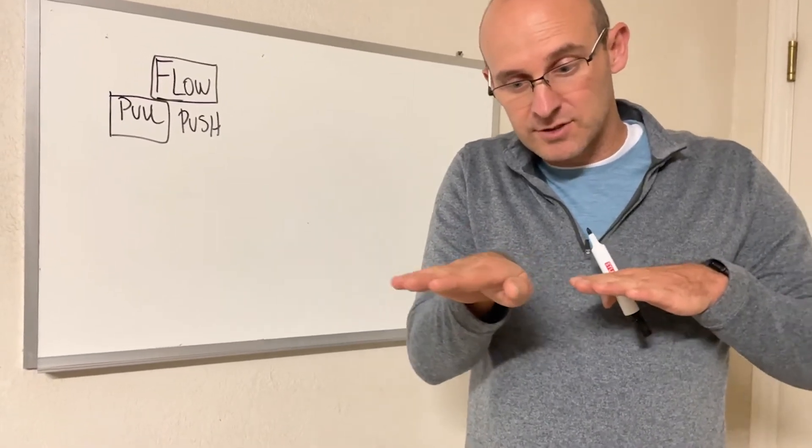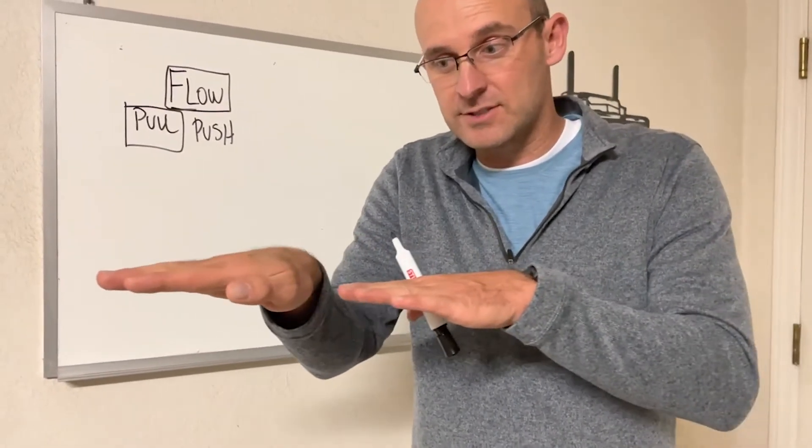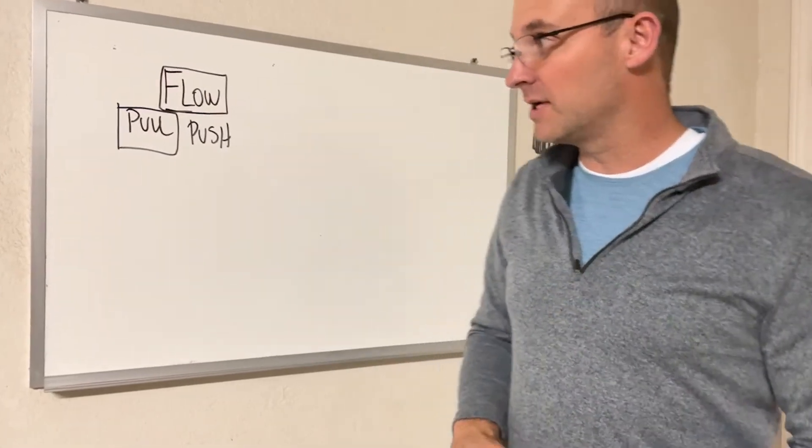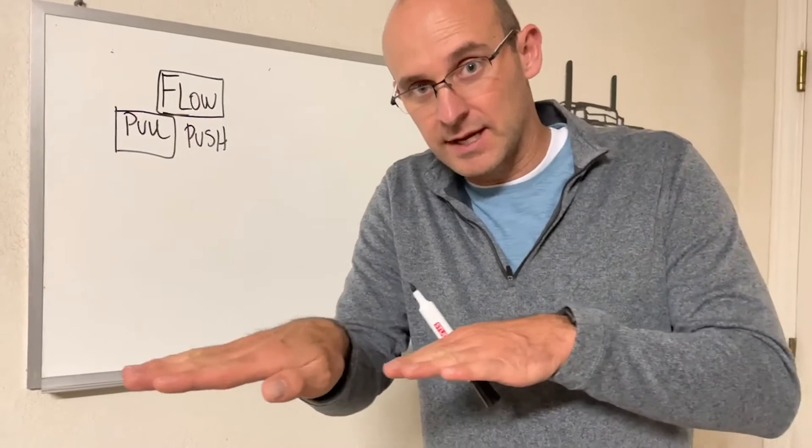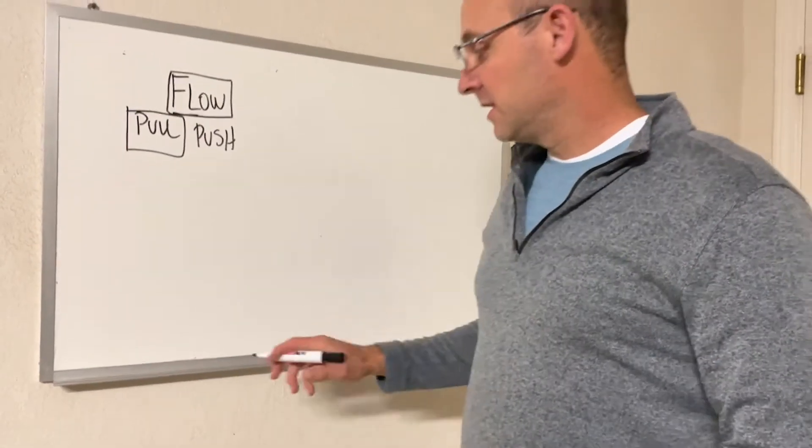When this contractor goes a little faster, this one can go faster. When they slow down, it goes a little slower. That's pull. Flow: they're both going at the same speed.